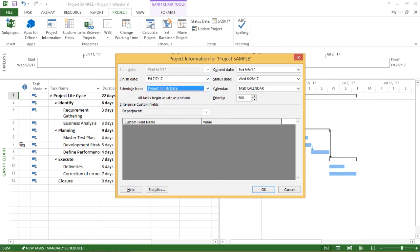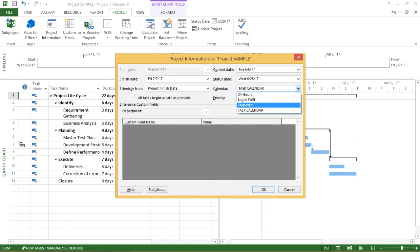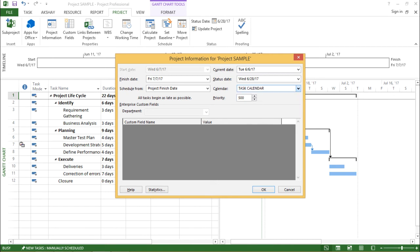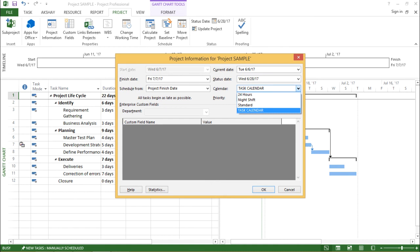Now moving on to the next option, that is my calendar. Now as you can see, you must be getting the option as standard. By default, it is standard. But in my previous videos, I have created a new calendar and I have named it as a task calendar and I have assigned this calendar to this particular project. That's the reason it is showing me this as task calendar. So using this drop down box, I can create my own calendar and assign this calendar to a particular given project.